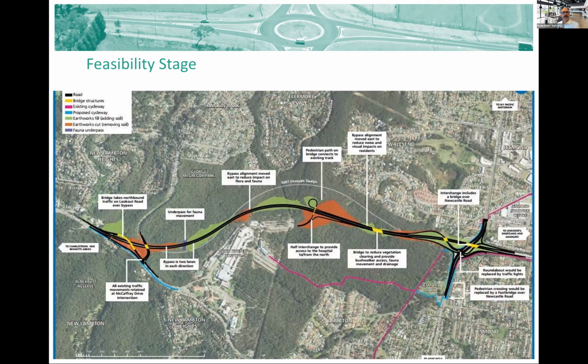A feasibility stage road safety audit is when you're given fairly high level, early sketches and plans. I sometimes call it the planning stage road safety audit. You can see big alignments like this often get a feasibility stage audit because people are asking, are these the right places for interchanges?